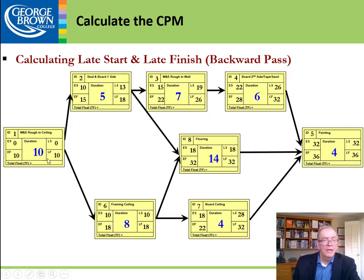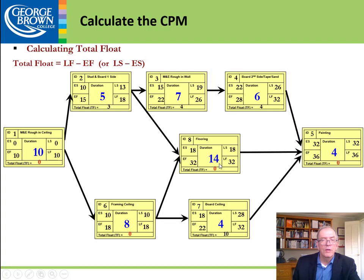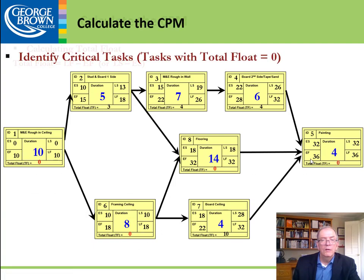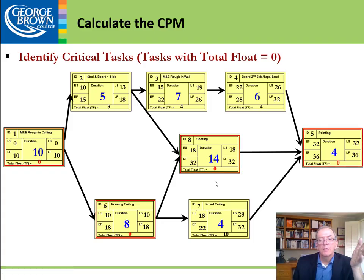The float is the difference between the late and early finishes, or between the late and early starts. Working through: 10 minus 10 = 0, 18 minus 15 = 3, 13 minus 10 = 3, 26 minus 22 = 4, 19 minus 15 = 4, 32 minus 28 = 4. Both starts and finishes must give the same float value, or a mistake was made. Following the zeros of float all the way through gives us our critical path.